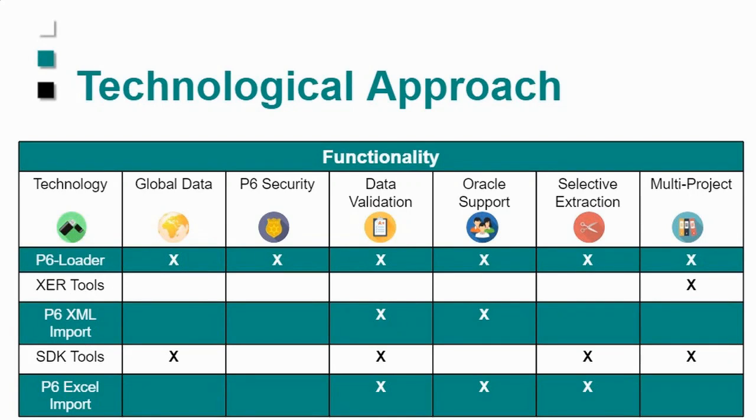Now, along the way, people said, well, it's a text file. We can edit this text file. But there's a few risks there. So the first one is, it's to move project data from one database to another, so it doesn't access any global data. There's no security around it. If you can import, you can import anything. There's no data validation either. So if you make a mistake, you could corrupt your entire database.